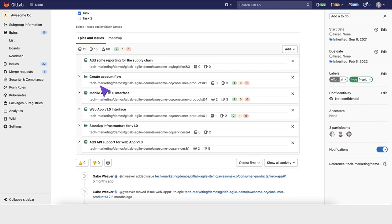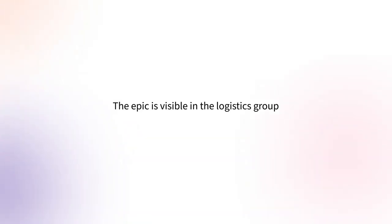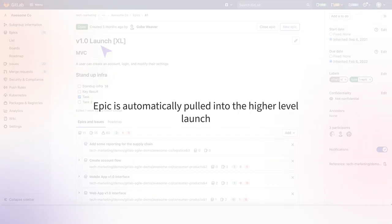GitLab will create this epic nested under the 1.0 launch. A logistics group was created, so the epic is visible there, but it's also automatically pulled up into this higher-level 1.0 launch.